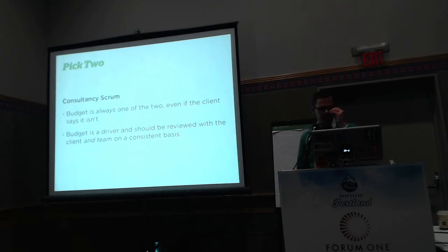Additionally, we found budget needs to be reviewed constantly, at least every sprint. What's your sprintly burn, right? How much money are you spending every 2 weeks, every sprint? It also helps to review it with the team, just so the team understands where everybody's at with the budget. Because when you're a consultancy,